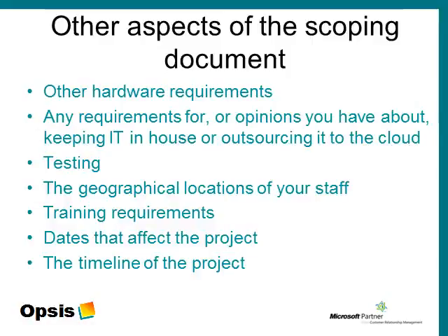There are several different types of testing, and different people are required for each. These types include unit testing, which is done by the developers as they produce their configuration. User acceptance testing, or UAT, done by selected users to ensure that the solution meets the scoped requirements. System testing, to ensure that the entire system is working as expected and at an appropriate speed, and if you've done any, integration testing, so that you are sure that the information that needs to pass between two systems does so exactly as expected.